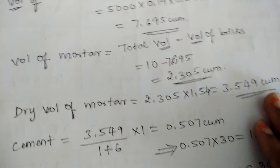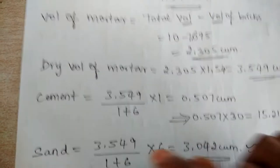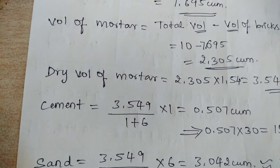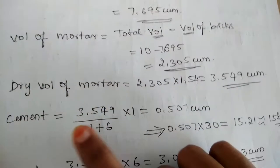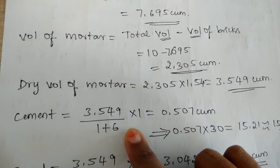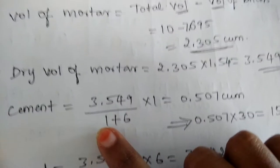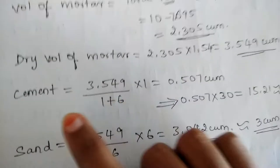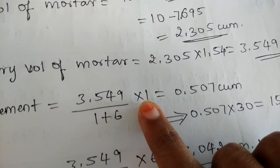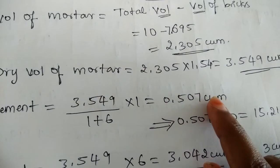Once the dry volume of mortar is known, let us find the quantities of material. The mortar consists of both cement and sand. To find the quantity of cement, we take the total dry volume which is 3.549, divided by the sum of proportion — the mortar proportion given is 1 is to 6, so 1 plus 6 — into 1, where 1 represents the part of cement and 6 the part of sand. On simplifying, you get a quantity of 0.507 cubic meter of cement.